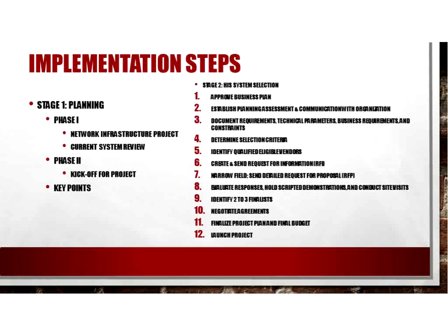Phase 1 would begin with the foundational infrastructure, including the data center and other computing environments and the medical internet. And also it will include in phase 1 a thorough analysis and documentation of your current state, how those key processes are currently being performed before designing a new workflow. So your current state, remember, is the beginning of your migration path, or that roadmap we talked about. Another key component of phase 1 would be the development of your master patient index.